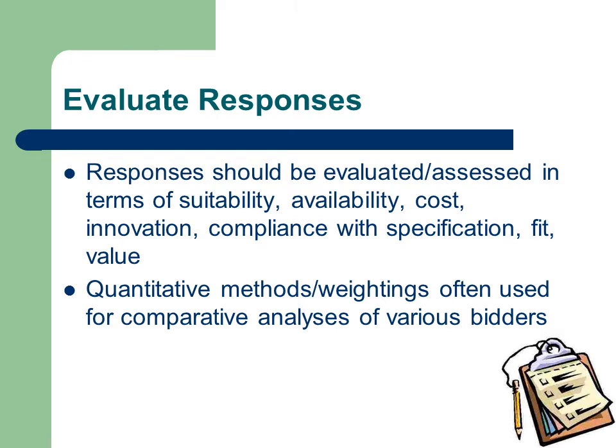You should predetermine how you are going to evaluate responses from your potential suppliers. Document your selection criteria and determine which of these are most important. Examples of selection criteria are suitability of product, availability, cost, quality, that is compliance with specification, and value for money.